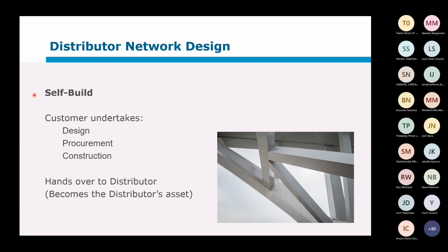If we consider the self-build option, what is going to change? The customer is now going to do this whole design, procurement and construction process, which you would usually have done. At the end of it, all of these assets are handed over to the distributor's assets.